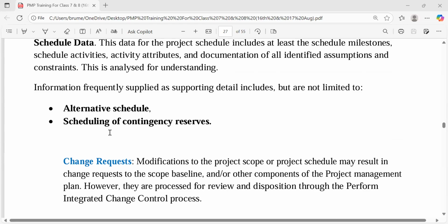So we got that. Now you looked at an activity that could have lasted for 4 hours, and instead of writing down 4 hours, you want to write 4 hours, 40 minutes. You want to give it an additional 40 minutes, peradventure some challenges may arise. Some delays may occur, so you know that your schedule will not be impacted. That is a contingency. So what is your contingency? 40 minutes, right? And that 40 minutes is to take care of the delays that you see may likely happen.